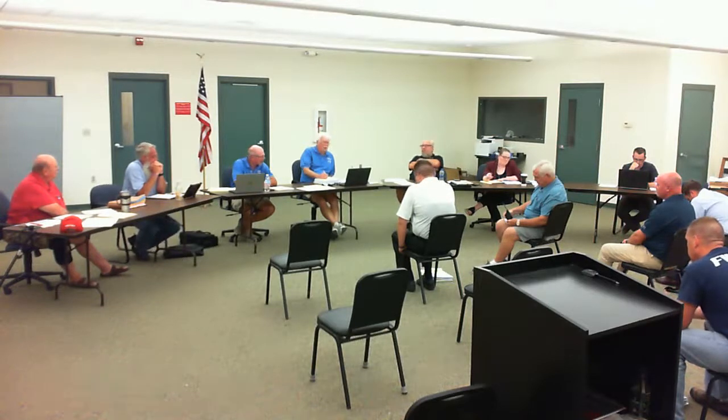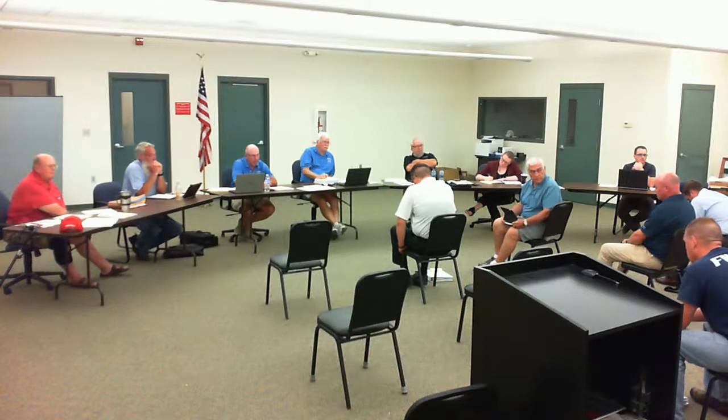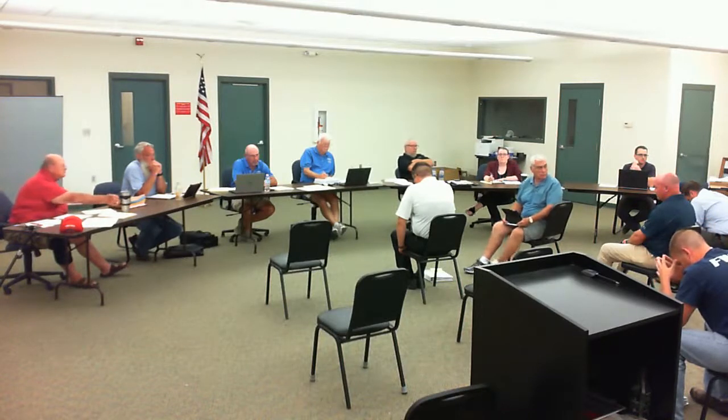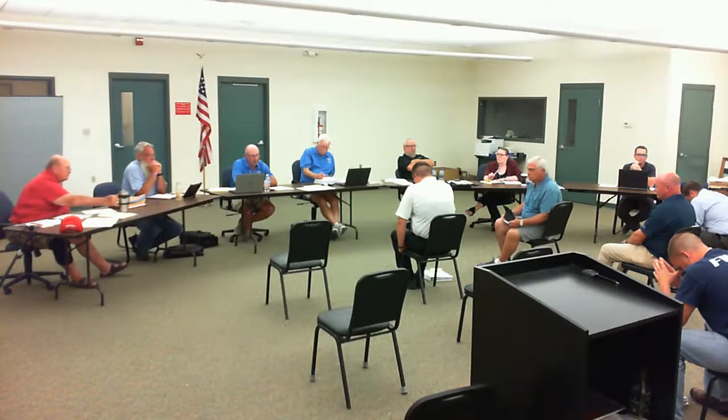All right, sewer maintenance. Just on the South Ridge, I was gonna bring up, they set all 3 manholes, they're almost done with the sanitary mandrel test and air test. I'll go out and be on site while they do that, watch the air test and the manhole test, and get the paperwork back on that, I can share. And then we've got 1 manhole set on Wabash Street tomorrow, and then the paving's all done. Paving the streets, and then we're still cleaning camera. When the camera's working.